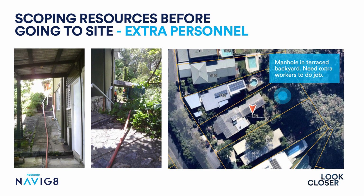Scoping a job before we go to site is really useful with aerial imagery. It helps us to get an idea of the terrain around the manhole. In this particular job, we sent an extra person to guide the hose to the manhole to avoid damaging the property. This meant better communication and safety as well, as the manhole was in a terraced backyard. I just learnt recently too that the elevation tool is very handy in determining the levels of a property, whether it's steep or flat. I haven't actually used that much myself, so I'm looking forward to getting in and using that for our planning.